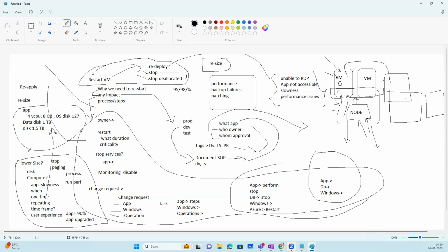Let's say there are like 50 to 60 servers you have to upgrade or resize, because it's a change that you identified. The SKU you gave at the time of deployment is not sufficient. All other customers might also see impact. So then you have to create a project, you have to engage a PM, and maybe you can drive it as well, depending on the company. So you have to coordinate with the application team, find out the downtime, and get approvals for the VM resize because it involves additional capacity and additional cost as well.